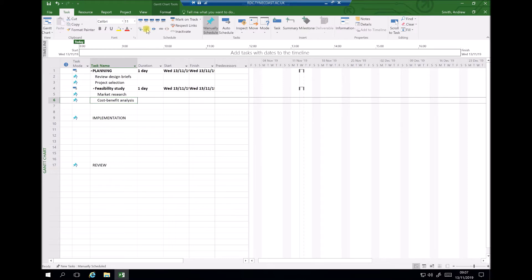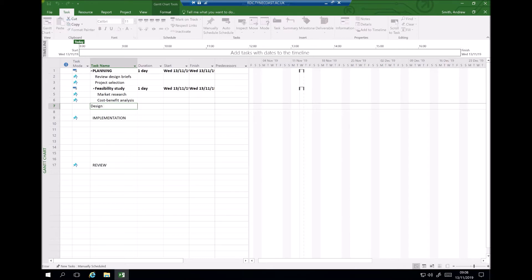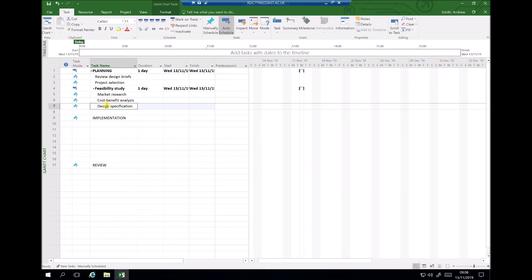For the purpose of this example, I'm going to include one more planning task: producing a design specification. The important thing here is that the design specification isn't part of the feasibility study, but it is part of planning. So we out-dent this task so that it sits in line with the feasibility study, project selection, and review design briefs. Only market research and cost benefit analysis are subsections of the feasibility study.